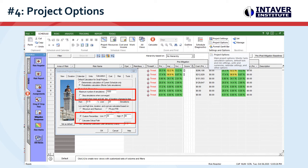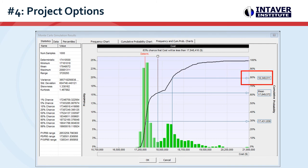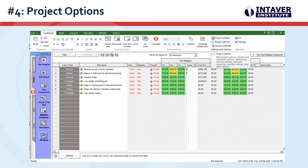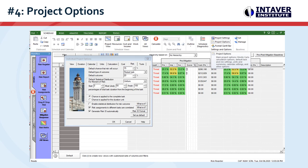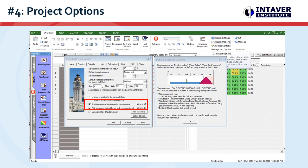These low and high results are shown in various views of the analysis, for example in the project summary or on a chart. In the risk tab of the project options, you will find three options at the bottom. The one that you will want to enable is the enable statistical distributions for risk outcomes. This will allow you to enter risk impacts as three-point estimates with a statistical distribution, as shown in this help window.